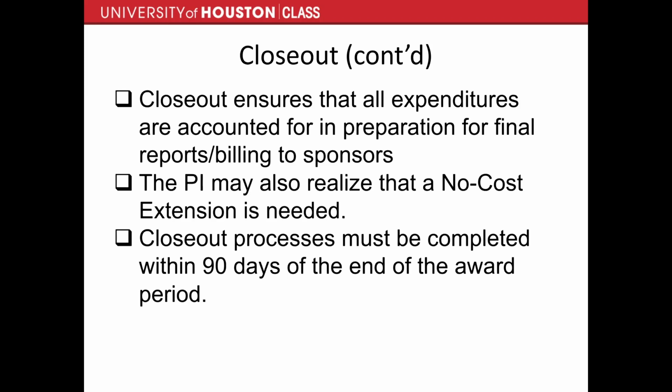A lot of times I've seen this with NIH awards. Usually no-cost extensions, if it's the first one, it's pretty easy to get one. Of course, you have to have a good enough justification for it, but from my time in post-award, I had never seen a no-cost extension request rejected.